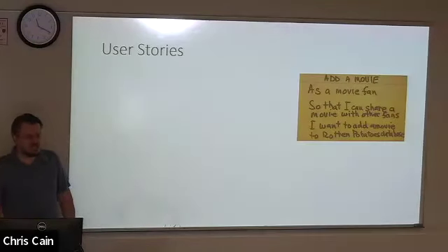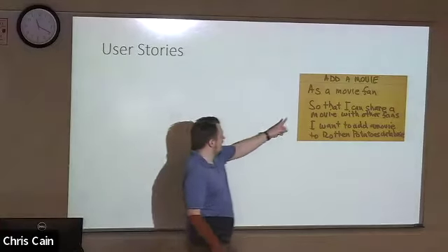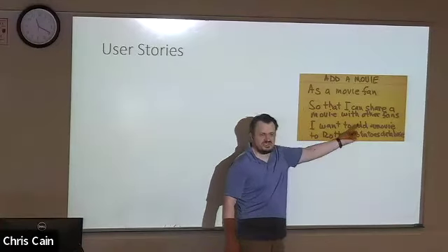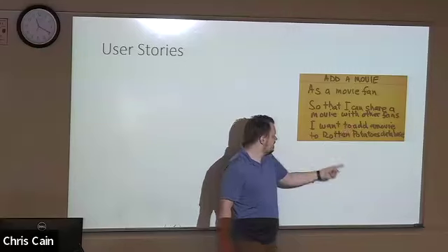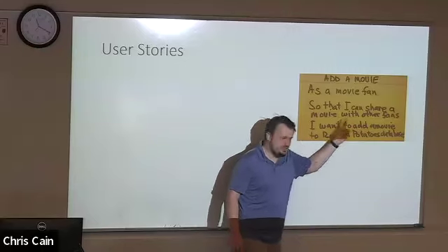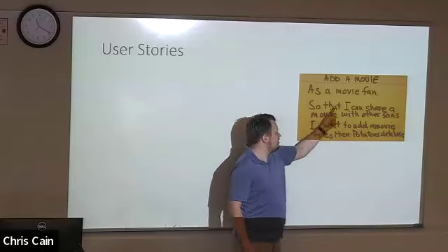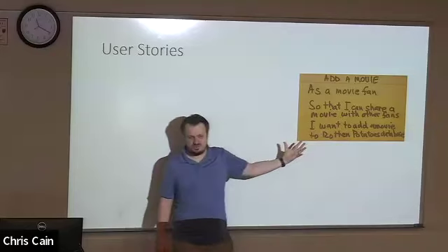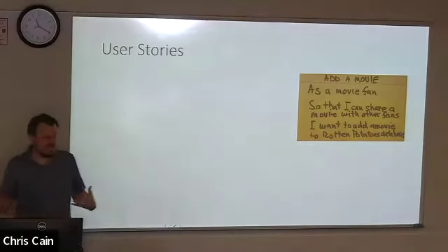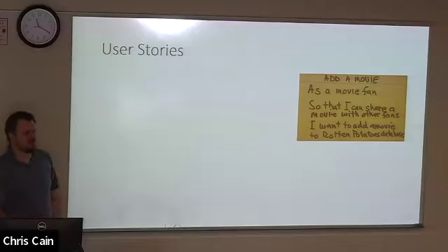And now we're going to ditch the idea of a description and use the form: as some stakeholder in the project, I want to do something so that what happens as a result of that? What functionality does it add from their perspective? So it's a little bit of the why, but it's a functionality-focused why.